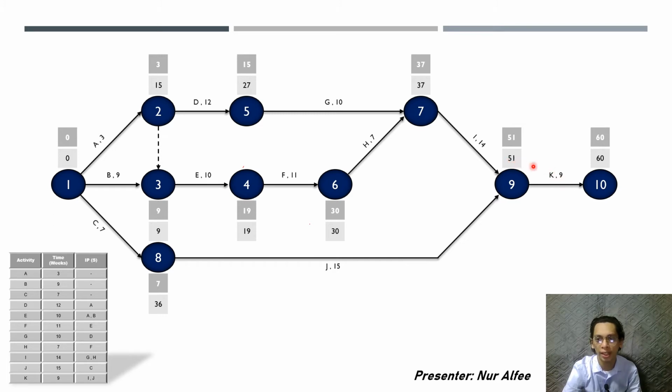So for all the LET we need to minus the event with the activities. Okay, I'm going to move forward. For EET, we need to choose the longest one if the event has two different activities. But for LET, we need to choose the shortest one.